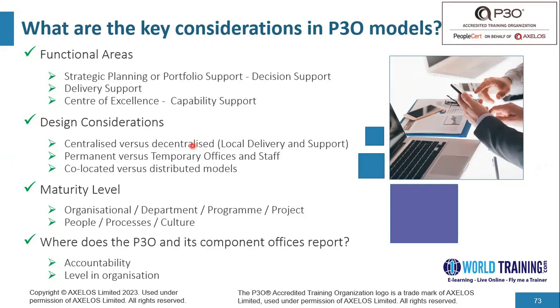In other words, you could have one organizational portfolio office, let's say reporting to strategy, and then you could have hub portfolio offices within IT, within engineering projects, things of that nature. That would be an example of a decentralized one. So when we design our P3O model, we have to ask the question, are we looking at a centralized design, or are we looking at a decentralized one?